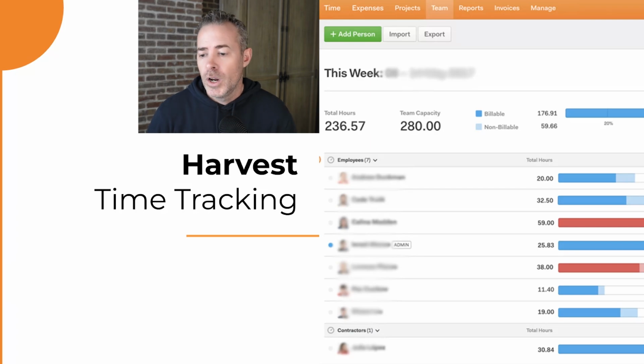One small tip that's maybe a little bit in the weeds on this, when you're entering time, one of the things that we found is really useful is that the resources enter the actual JIRA ticket number. We talked about JIRA earlier in the session. Enter the JIRA ticket number in the note. That way you can trace the time back from the time entry to the ticket. And a lot of times that can help you review how well are we estimating stuff on the front end versus what it's coming out to in reality.